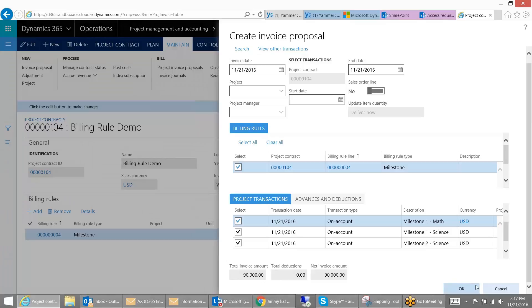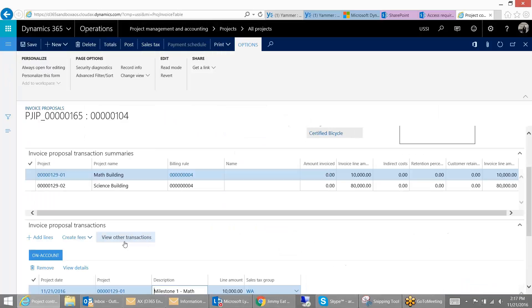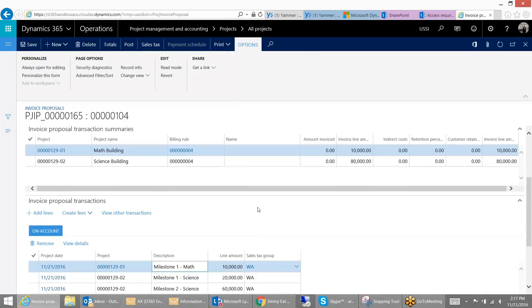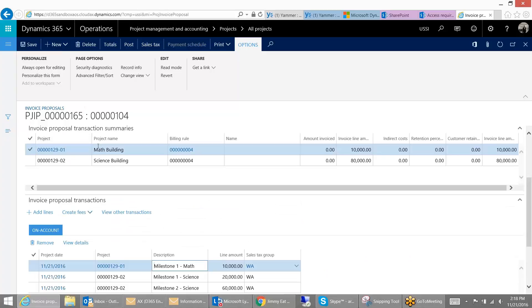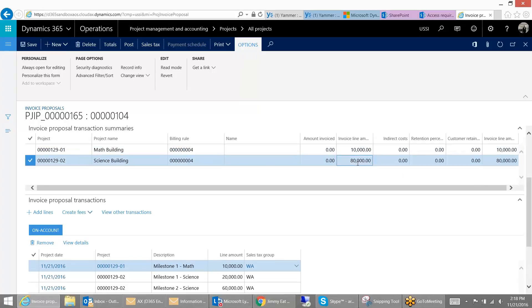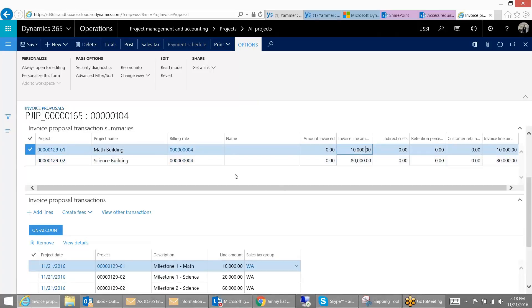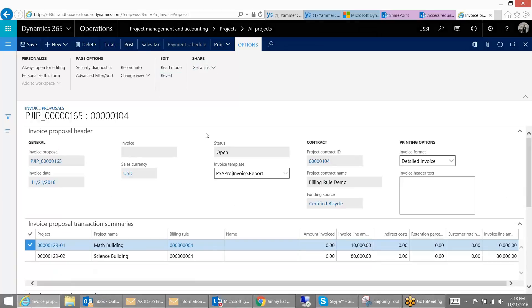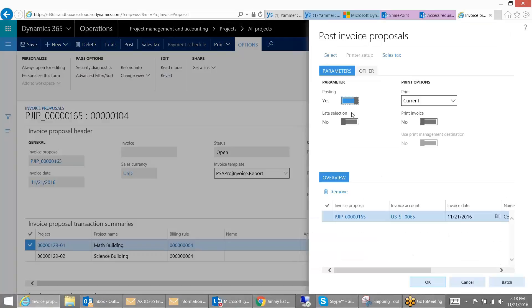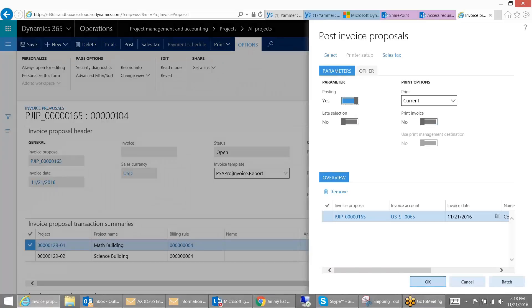And this will create our invoice for these three different transactions, which we see down here. And at the top, we see it consolidated by the project. So we can see we're doing all $80,000 of the Science Building, but only $10,000 of the Math Building and nothing in the Athletic Complex. And then we can go ahead and post this. I'm not going to print it at the moment. I'm just going to post this invoice.